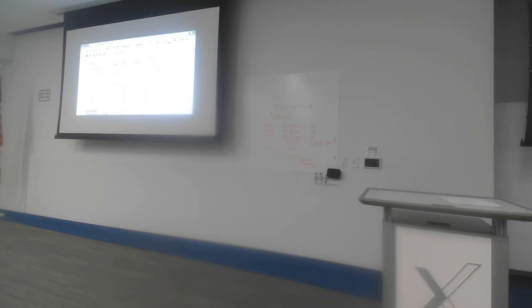So let's go ahead and do that. So again, to bring the overall project duration from 15 down to 14, I'm going to crash activity J, J asterisk, because I've only one day to play with and this will be it maxed out. It's going to cost me €8, so 135 plus 8 is 143. I'm going to get another day's bonus for that, so minus 48. And so 143 minus 48 gives me 95. Now you can see here probably already, because it's costing me €8 to crash J, and I'm only getting €8 as a bonus, well, that's not going to make much difference to me financially. So we're keeping an eye on that, but let's go ahead anyway, keep a track of the project paths so we can see how it plays out.